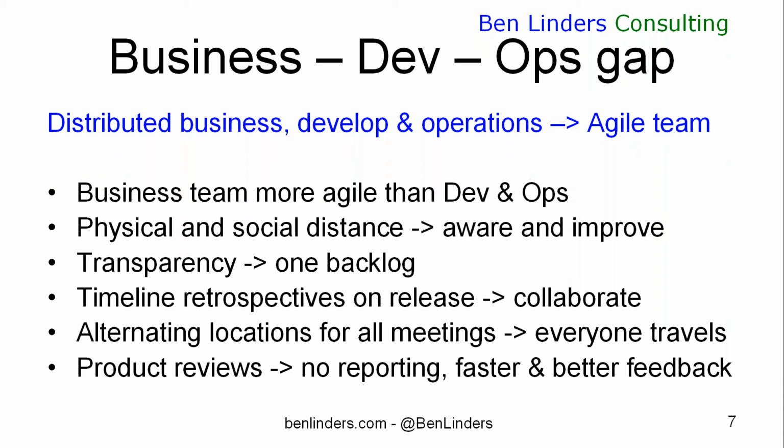And the first step in there was to create one backlog, which might sound like a no-brainer, but in the organization, they had backlog management at the business side, but once they got into development, they had their own backlogs, which were separated from the business people, which actually weren't even visible, where they managed their own stuff. So the step towards one backlog was a big step to make things visible already.